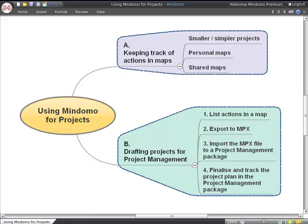For small projects, you can put your project information into the map itself and keep it up-to-date in there. For larger projects, you can brainstorm your actions in the map and then export it to an MPX file. An MPX file can be imported by a wide range of project management tools and will transfer the task information from your map to the project management package where you can keep track of it from there.